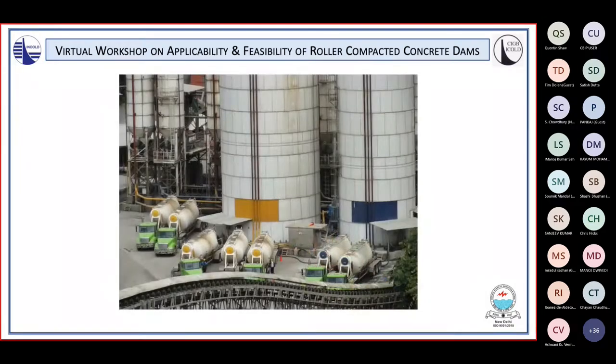This is a picture of the actual truck traffic during construction showing unloading of the 7 bulk trucks simultaneously. This indeed agrees with the BIM model studies of truck traffic and allowed for smooth operation of the bulk material handling and storage at the batch plant area without limiting the RCC production.